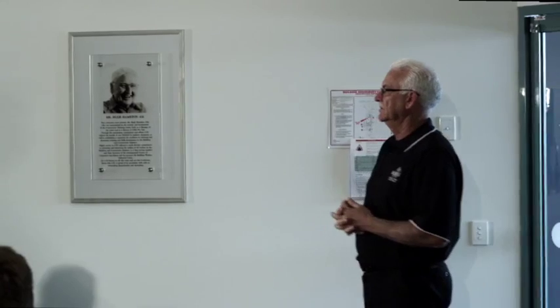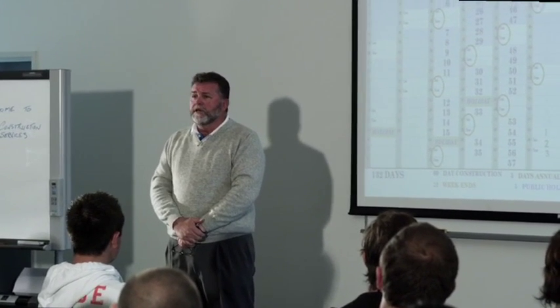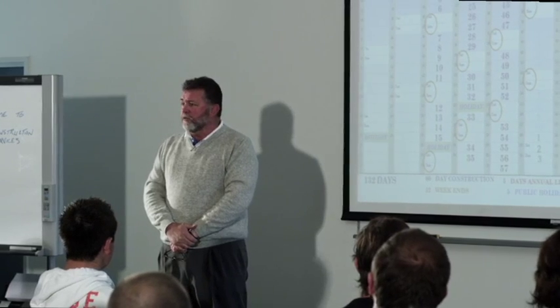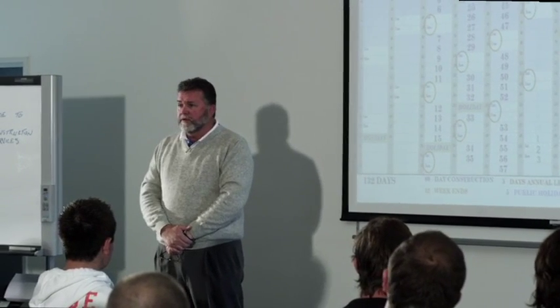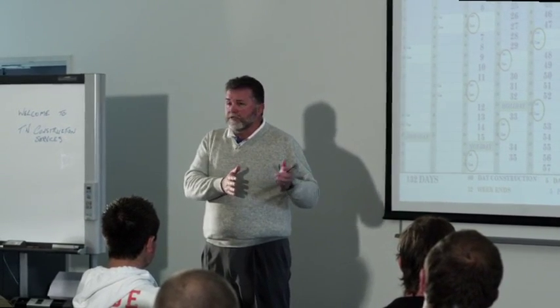What do I do? The good thing about a time extension claim is that, unlike a variation where the owner has to actually sign it, it is simply a document you give the owner. They don't actually have to sign it. They can dispute the claim, but that is a dispute I'd rather have later on. In actual fact, Paul is right.